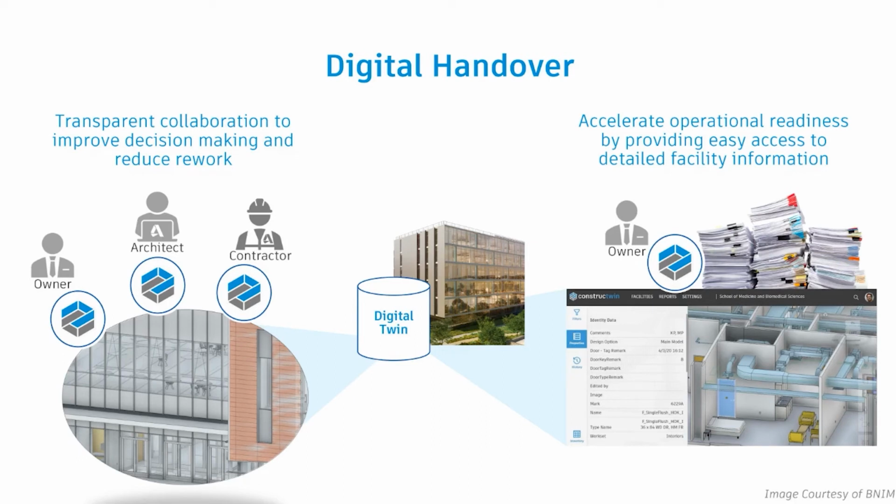But again, that information becomes more important to you as an owner than it does to the contractor as a whole. So as you're looking at that, transparency becomes critically important to make sure that everyone's on the same page doing the process. If you're asking for 15 things to be filled in on every single piece of equipment that is being installed, we've got to make sure that's happening. That way at handover, we're not waiting weeks to make sure those fields are done. It's being done live and in real time. Now, many contractors may say that this is going to extend the construction life cycle. It's going to make things worse. It doesn't. There have been many studies out there. If you input the data as it's being installed, it is not any longer at the end.